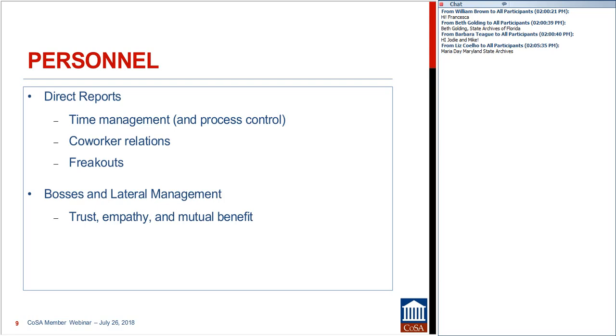I do them, like everything else, every 2 weeks for my direct reports. But if you were working with a lot of collaborators who were not direct reports, as project manager, it's nice to at least monthly have a 15, 20-minute special one-on-one check-in meeting to make sure that things are moving ahead in the way that they need to.